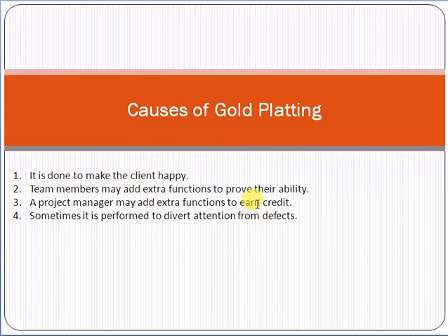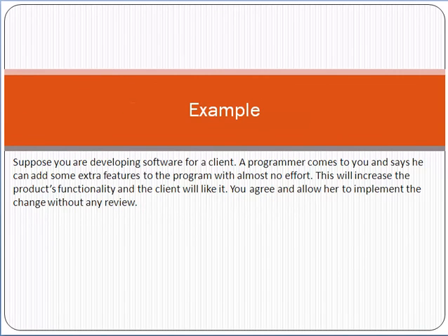Honestly saying, especially in the software industry, it is a very common practice that we do these things. In the last, I want to give you a very simple example, just so you can remember gold plating. Suppose you are developing software for a client. A programmer comes to you and says he can add some extra features to the program with almost no effort. This will increase the product functionality and the client will like it. You agree and allow him to implement the change without any review. So this is called, friend, the gold plating concept.